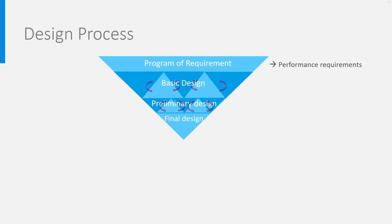After this phase comes the basic design phase. First ideas are developed and discussed with the client, architect, and other experts. Will the direction be towards heat pumps or district heating? A high-tech HVAC with lots of controls or a less sophisticated but more robust one? Which insulation level will be chosen? What type of glazing is recommended? Which zones can we think of? Will the ducts be sized for all-air or for hygienic air? What about solar panels? This phase is creative and interactive. Building simulation tools may be used, resulting in a few different designs integrating the wishes of architect and client. Budget is based on cost indicators from former projects, and the final choice is made by the client or architect.